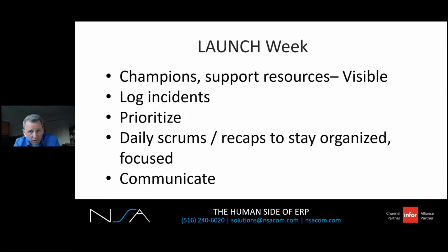So all went well on the launch weekend. The data is ready and balances. It's now launch week, Monday morning. Champions and support resources should be visible to the operators and the end users. Ensure the operators log incidents. Ensure the support team has a clear process to log, prioritize, and escalate incidents.